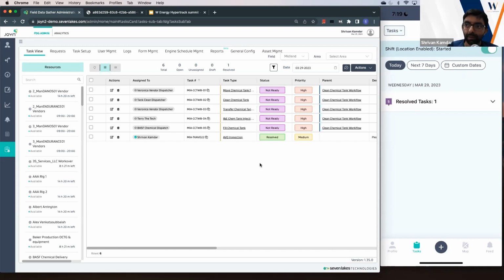Yeah, so with this product that we just saw, the roadmap is pretty fast paced. There's constantly new things. Most of the work we do is maybe 10-15% fixes, 85% net new additions. So I think it starts with clearly defined product requirements. The acceptance criteria has to also involve what the performance criteria are for this feature.